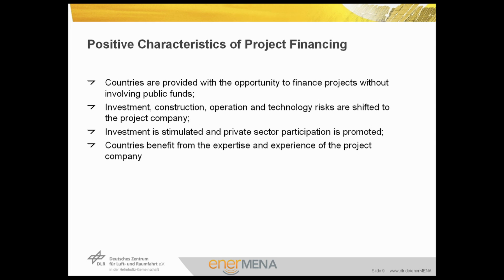The characteristics of IPP projects are: countries are provided with the opportunity to finance projects without involving public funds. It could also be with public funds, but it gives the opportunity to do it without needing that. Investment, construction, and the operation and technology risks are shifted to the project company in this case.